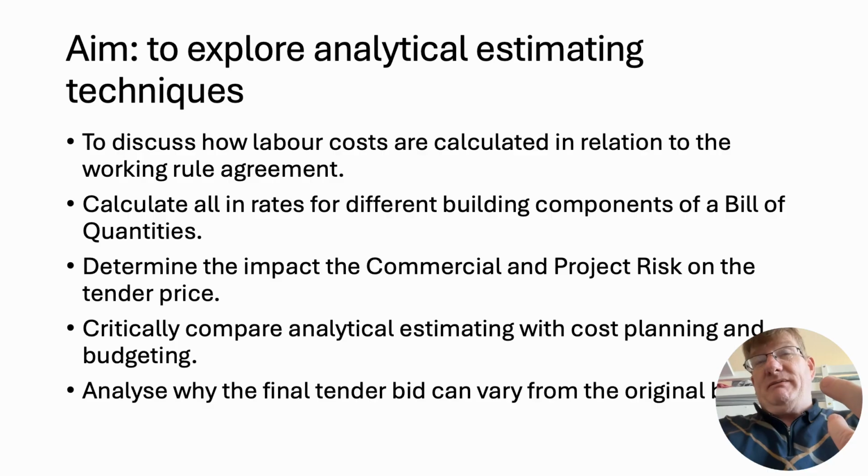So you get a quote from maybe a material supplier, or you work out your labour costs based on the National Working Rule Agreement. Those are the things you can start to do in a much more analytical, and some would say much more accurate, way. That's really what the questions in LO3 and LO4 are holistically asking you.